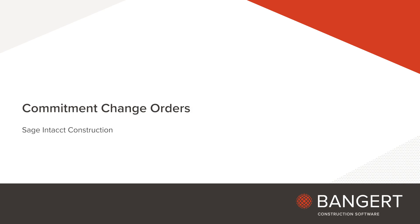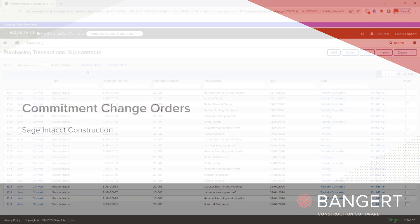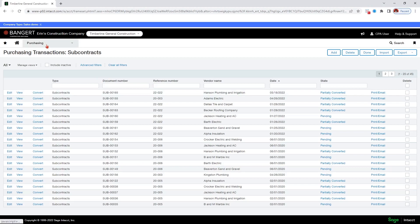This class is for commitment change orders in Sage Intact. In Sage Intact, commitments and change orders are created in the purchasing application.